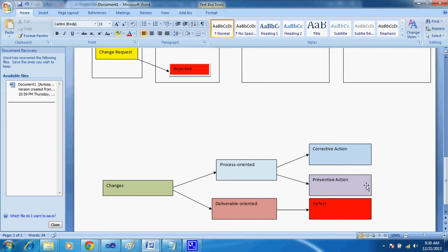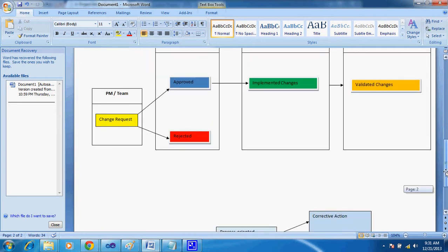So these are some of the terminologies. You have changes, the changes having a life cycle of being approved or rejected. Then you analyze the impacts, you maintain a change log. So these are some of the processes followed within the integrated change control process as such. The change control board is a responsible body which can approve or reject changes.